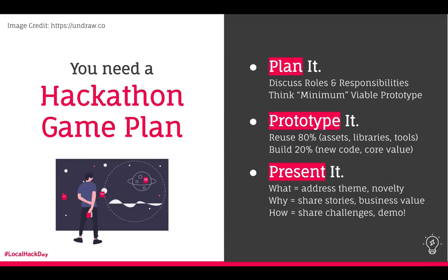Now, over the course of the past 10 years or so, I've participated in hackathons as a mentor, a judge, and a participant. And it seems to me that we need to think about this in 3 phases. First, plan it. Take a little bit of time up front to discuss who's taking on what role and responsibility, and then think about minimum viable prototype. What is the amount of work you need to do to show something that is complete in the amount of time that you have? Second, prototype it.